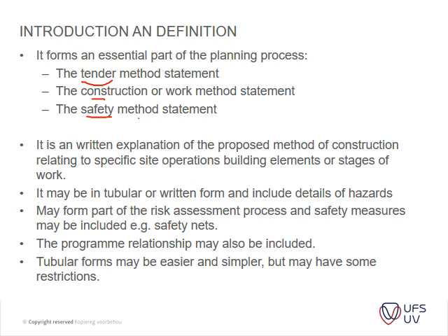It's a preference thing of actually writing it out or putting it into a table and having it in a point manner. Your scheduling, your program is also a method of capturing the method of execution. So usually that runs hand in hand. Your program and your method statements complement each other.